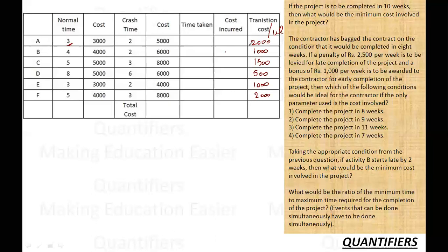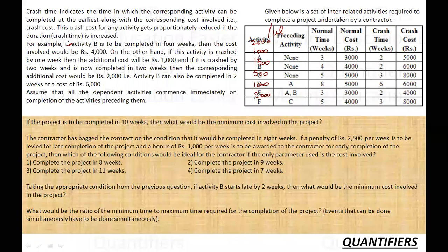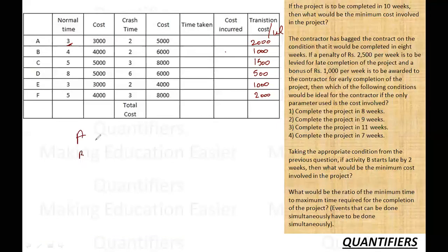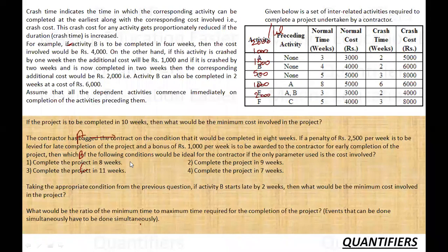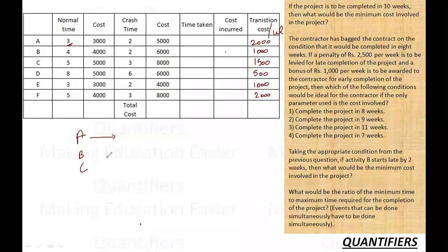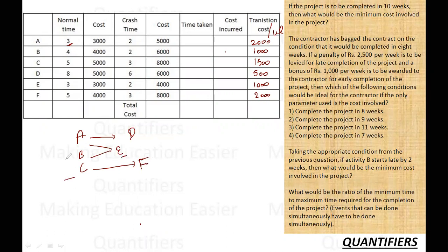Now, the activity dependencies: A, B, and C are independent. D must be preceded by A. E requires both A and B. F requires C. So F cannot start until C is done, D cannot start until A is done, and E cannot start until both A and B are done. Question 1: The project has to be completed in 10 weeks — what is the minimum cost involved?